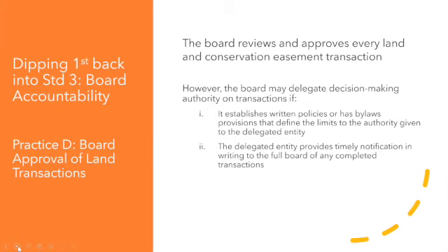Now, it's often the case that boards initially hear about a land protection possibility early on. They might discuss the merits of further developing a property transaction and whether or not to incur project planning expenses, including the cost of legal and environmental investigation. The board might vote to order an appraisal or incur some preliminary expenses. And during project planning, the board might receive progress reports at each of its meetings.